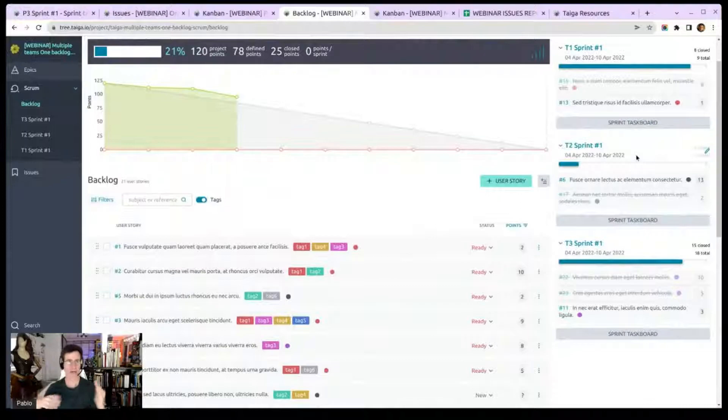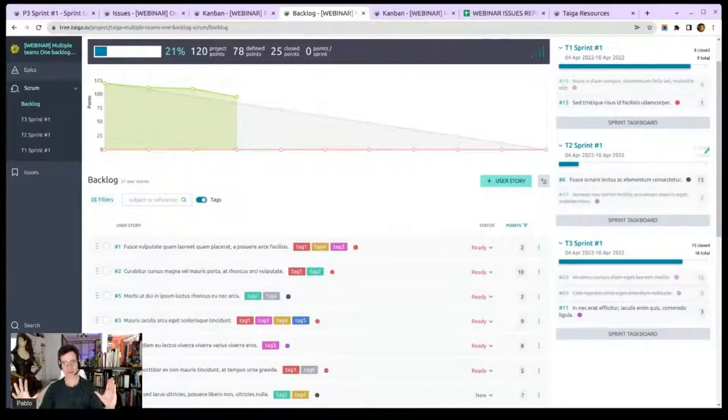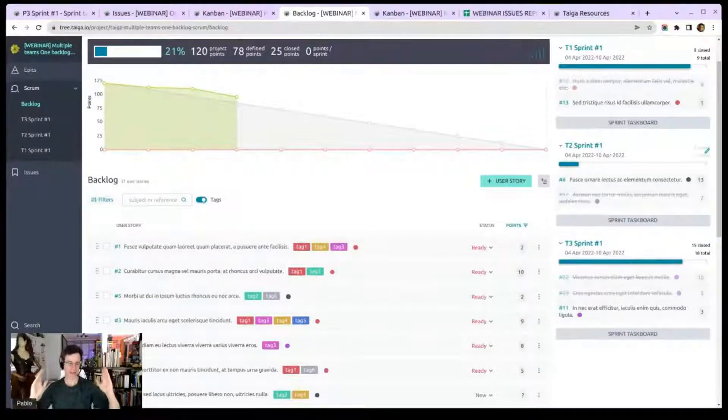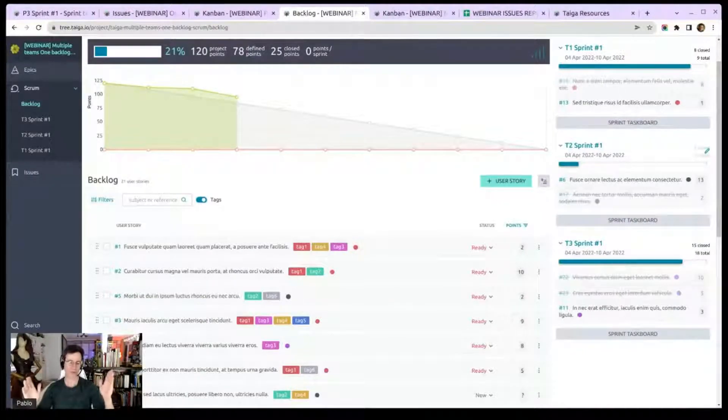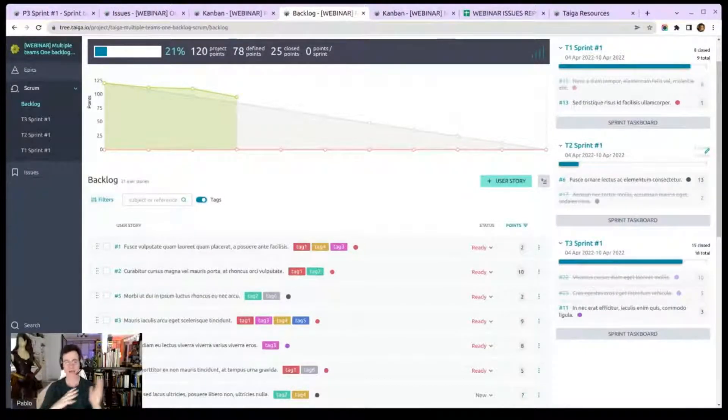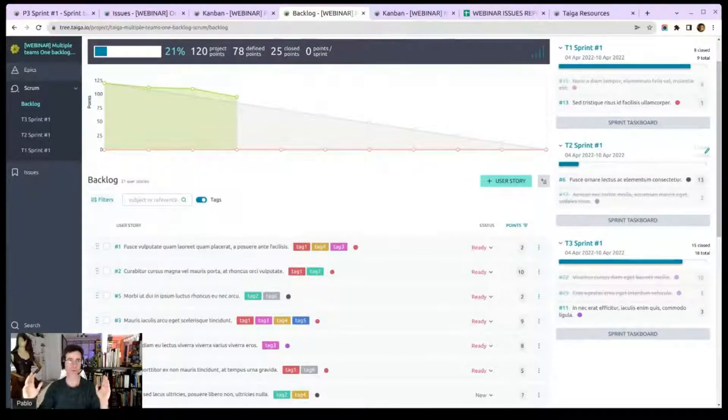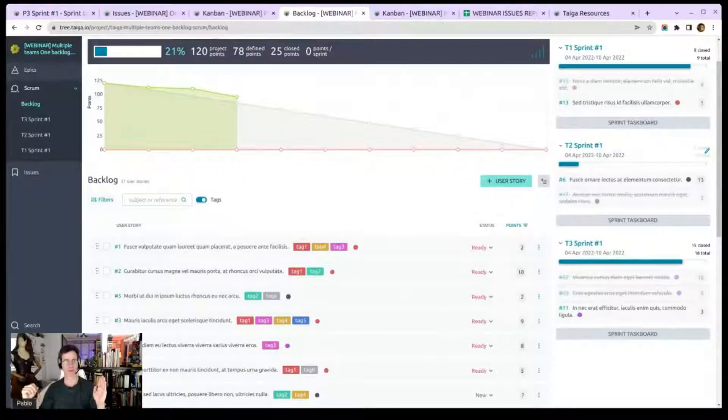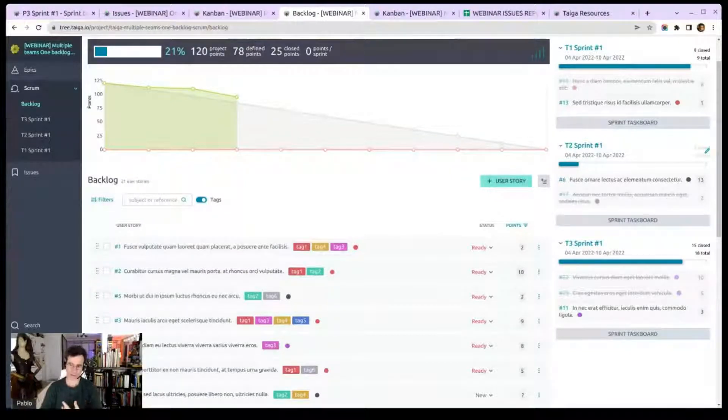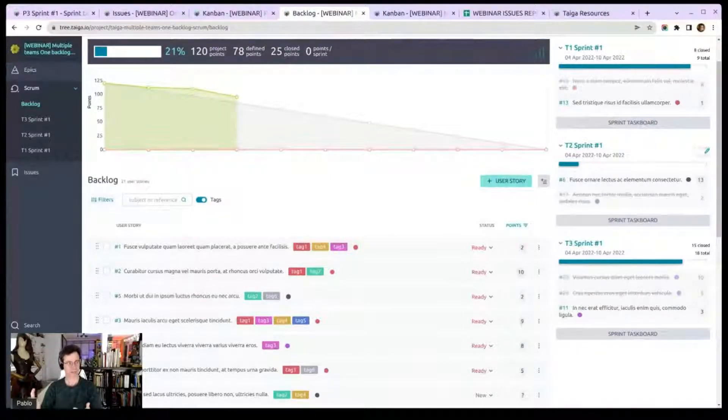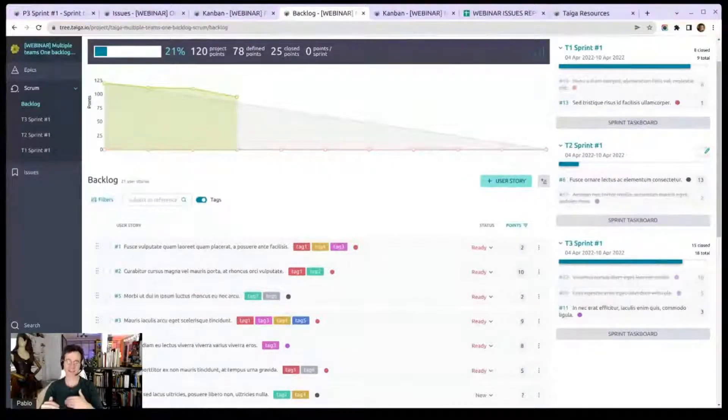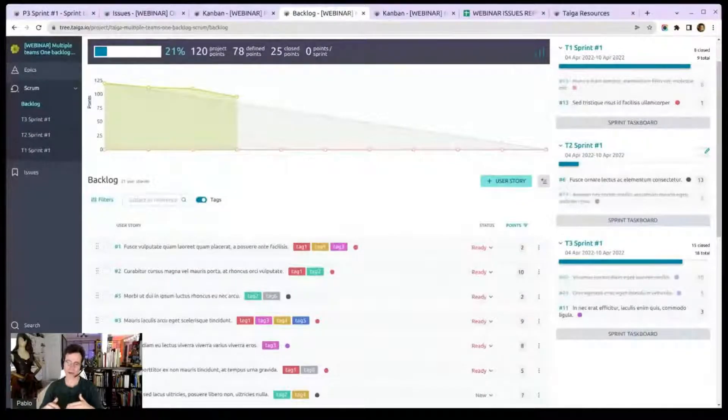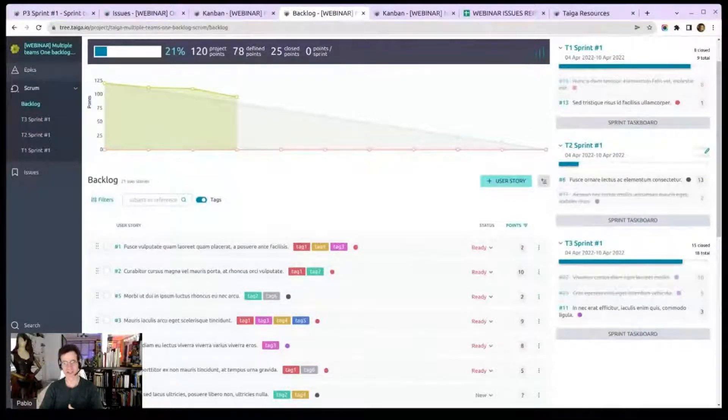Again, you could have fully overlapped sprints. Like, you know, the 15 people basically have two week sprints and they just have these splits. Or you could have longer sprints for team one and like smaller sprints for team number two. As long as you have team commitment, you protect the sprint. The different statuses of the user story are consistent within the sprint and the team.